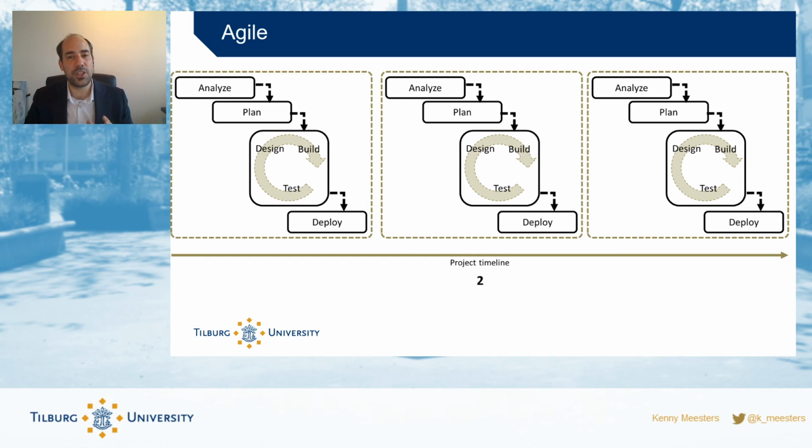So the risk of agile development is that there is no end state, and you don't know when the project will be done. Some companies have embraced that and will say, we're going to keep developing, we're going to keep changing, but you have limited resources, a limited project budget, limited time. The risk of agile is that you will end up with a prototype and it won't be finished because you're still in this cycle of finding out the requirements. Therefore, it's important to make sure that in agile you either define these end states, or that every delivery is not only a prototype, but you also work toward real systems that can be deployed as stages.